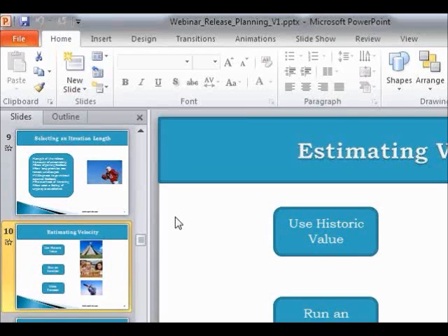Now, as you move forward, you discover a reality. So it's a speculation. You start with a goal in mind, but once you get into the project, you discover the reality, and that reality will help, as the release plans need to be updated frequently, especially at the beginning of the next iteration. You should update the release plan on the basis of the data, the reality which you have discovered.